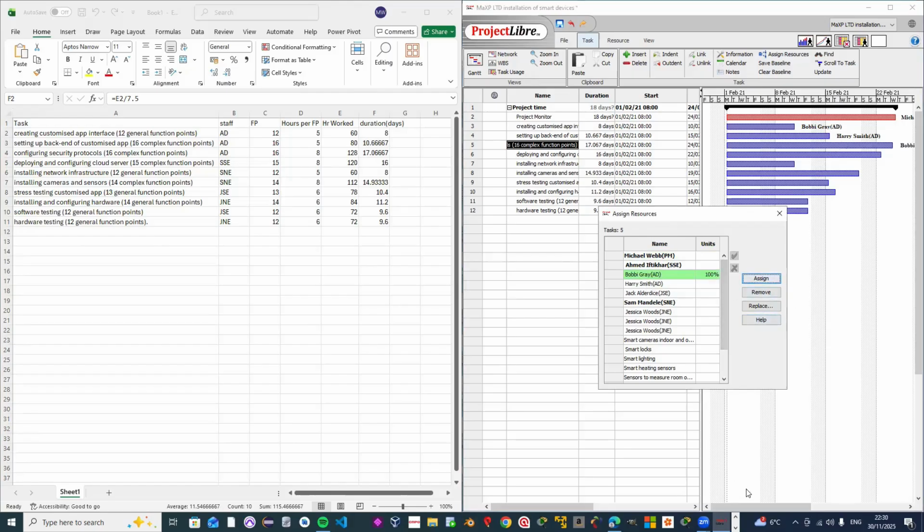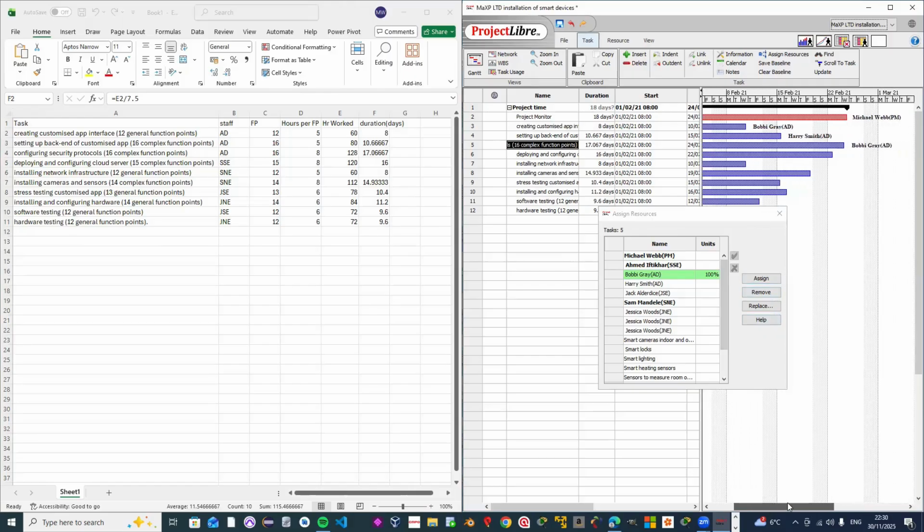All right. But this is our dilemma. Bobby Gray is working on this, which is also coinciding with this one. Bobby Gray is one person. Bobby Gray can only work on one task at a time. All right. So what we could do is wait for Bobby Gray to finish this task, then do the other one.